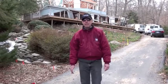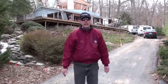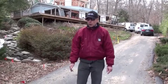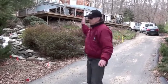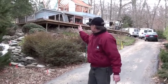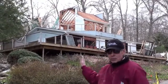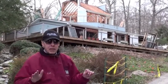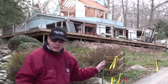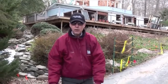green building. Kate and Anish worked on the design of this home with architect David Rydell from New York, and in essence what we are going to do is remove that second story from the home, which you can see up there. We've already started the demolition. We're going to remove the second story from the home and build 2 new stories above the existing first floor. In essence, we're going to take the home from 2,600 square feet to just under 4,400 square feet.